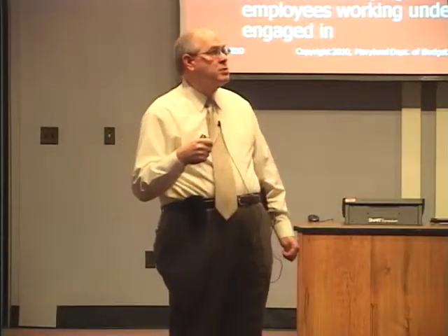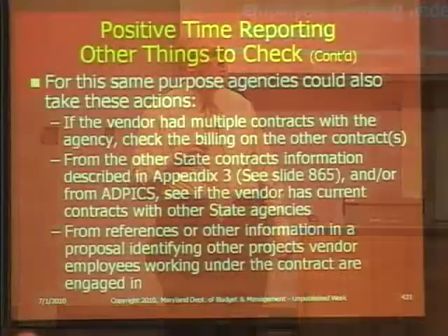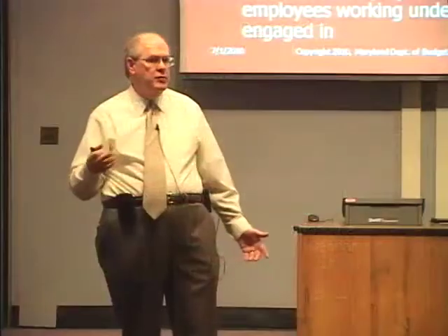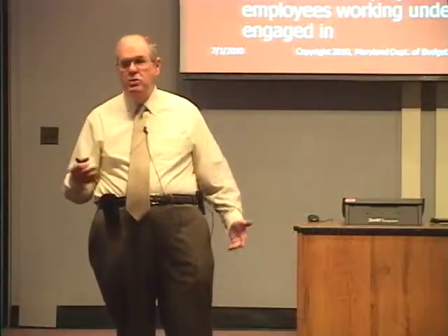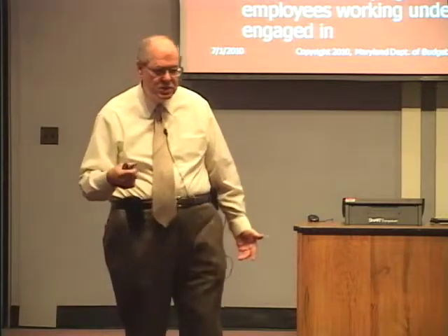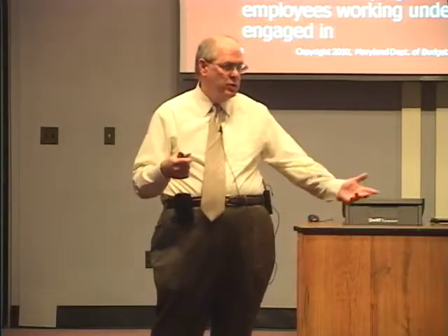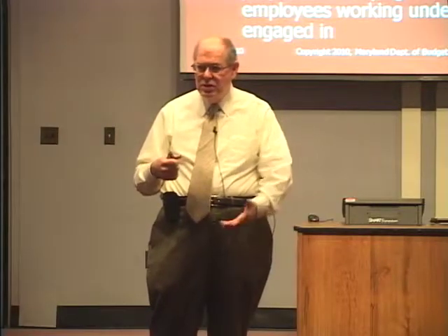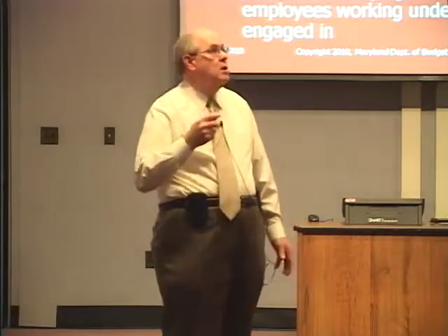If there were other state agencies that had contracts, in AdPix you can find out if the vendor has, by doing their vendor code, vendor registration code, or whatever that name is, you can find out if they have other state contracts, and you could potentially check with the other agency and see whether a given person is being billed to them as working at the same time they're being billed to you.